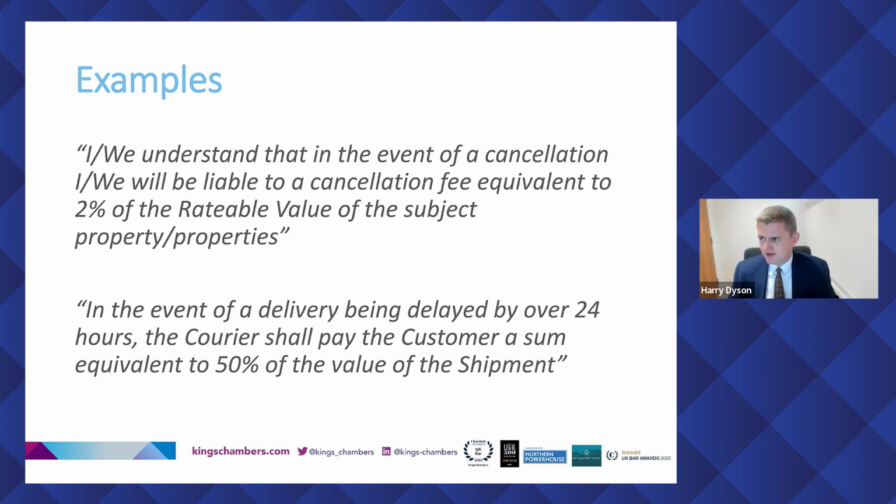So the second leg was whether or not there was a legitimate interest. Of course, a concession one would have to make is there is a legitimate interest in people protecting themselves from parties cancelling when they've already commenced work and incurred fees. Fine, there was no getting away from that. But I argued that there was no legitimate interest in a clause that prevented the defendant from terminating the contract under any circumstances and being held to ransom effectively for this 2% value. What it represented was a wholesale ban on cancelling the contract, no matter what happened. And I said that there's no legitimate interest in that being the case.